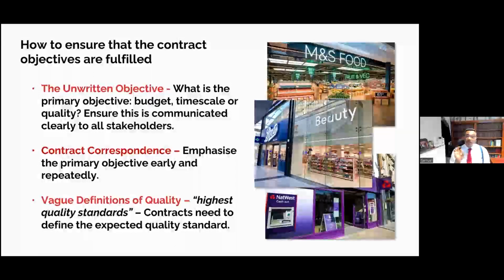I said that once you have identified the written and unwritten objective of your project, capture it in correspondence, communicate it, not just at the outset, but repeatedly and consistently, so that all stakeholders will get a buy-in. They will all recognize that, come what may, delivering this project on time was primary and everything else was secondary.